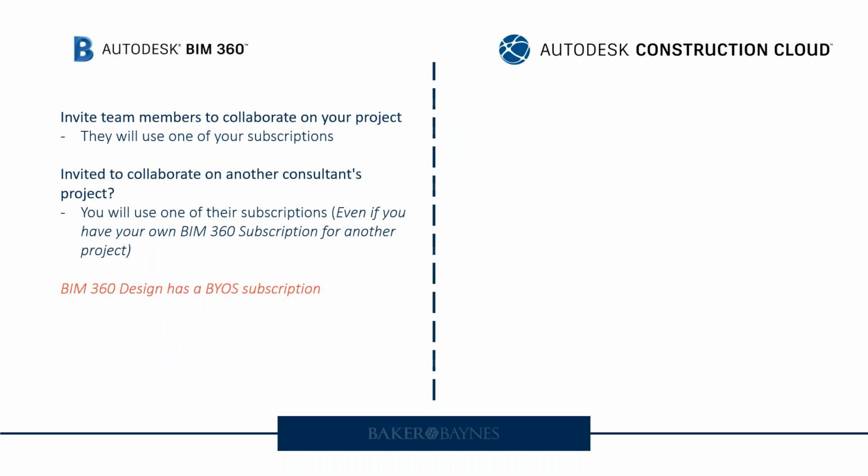Now, there's a bunch of questions when we looked at the frequently asked questions from our customer base around the subscription options and how these work. In the BIM 360 environment, if you invite team members to collaborate on your project, so Yanni's creating a new project and I invite someone from this call to join me on that project, that person will use one of your subscriptions.